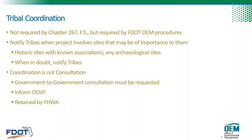If a tribe requests government-to-government consultation for a federal project, you will need to inform us at OEM. Our day-to-day correspondence with tribes is what we consider coordination, but formal government-to-government consultation is still the responsibility of FHWA per the NEPA Assignment MOU. So if you get a request from a tribe for government-to-government consultation, let OEM know and we will route that up to FHWA. For state-funded-only projects, correspondence to tribes can be sent by your office, but for federal actions the letters will be sent by OEM. In either case, I'm always available to review the letters to make sure we're communicating proper and relevant information in a productive and culturally sensitive way.